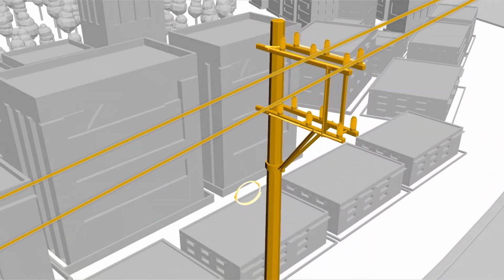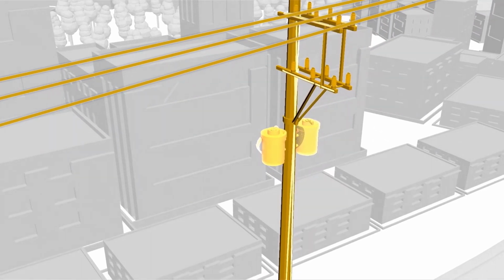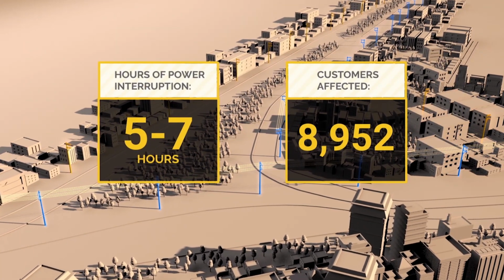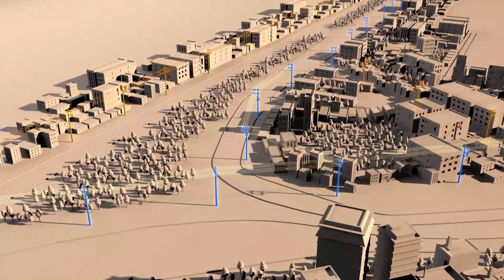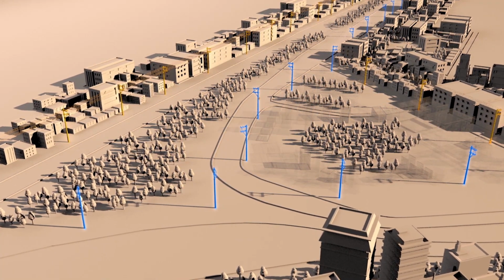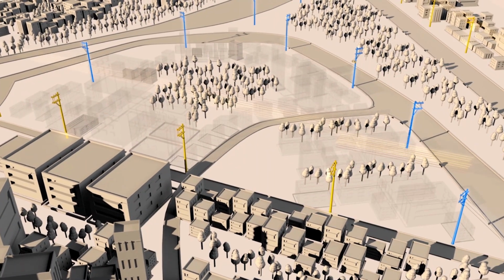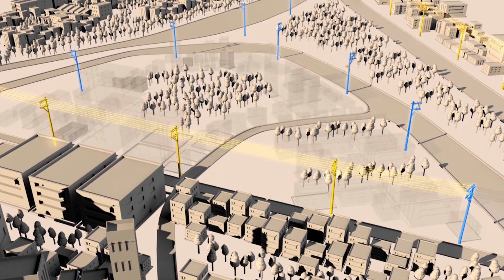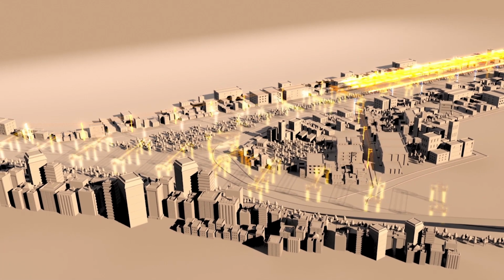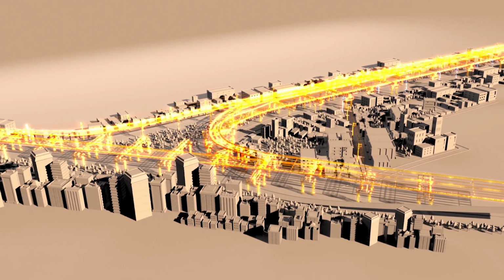Once the new poles are fitted with new electric conductors and cables, they are ready to be energized. Energizing the new lines requires a power interruption in the old power lines. The power interruption allows the new power lines to be connected and the old power lines to be safely cut and removed. Upon energization, power is restored to the affected areas and the old poles can now be removed. The pole relocation is now complete, and the project builder can now proceed with finishing the interchange.